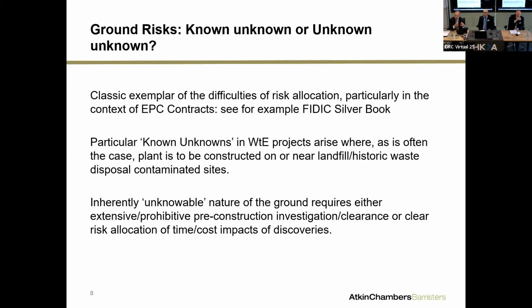What that means for developers and contractors is they must think about that inherently unknowable nature of the ground when either tendering or defining what you're looking for from the contractor. Do you, as the employer, choose to go down the route of extensive and probably prohibitively expensive investigations in the ground beforehand, so as to provide shiny reports which try and define every single problem with the ground, and then find there's still a fridge freezer at 20 meters down, which you hit with your pile?